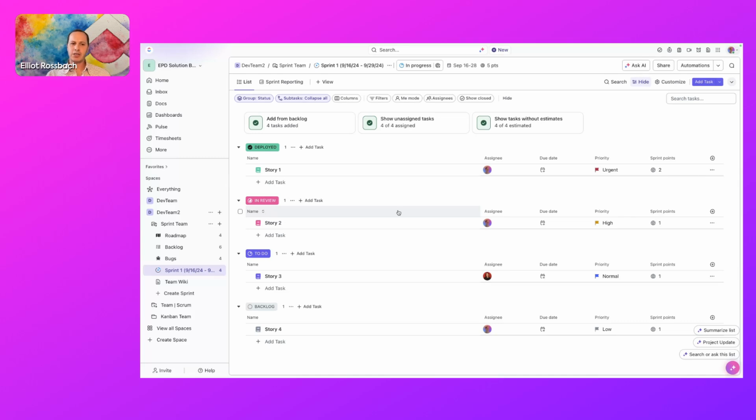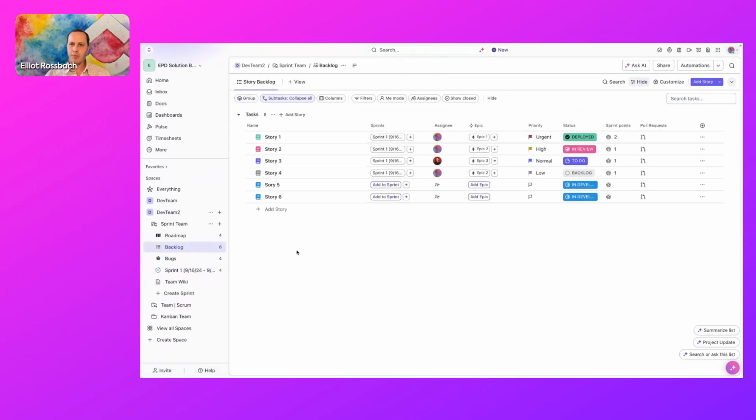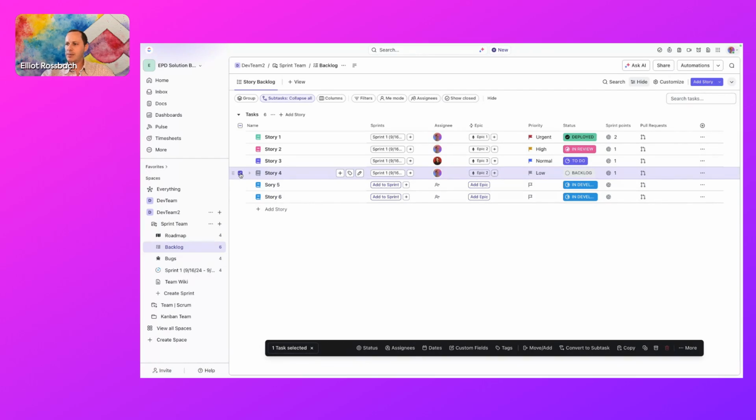Now, I know that we did have some questions about epics. How do you do bulk assign? Because those are some updates that came to the platform. Heading back to our backlog, just remember that your backlog is where all of your work actually sits. If you wanted to link this work to an epic in bulk, you can hit the selector on the left-hand side here. Just like with Gmail or other features, if I hold Shift and click, it's going to select everything within the items that I was selecting.